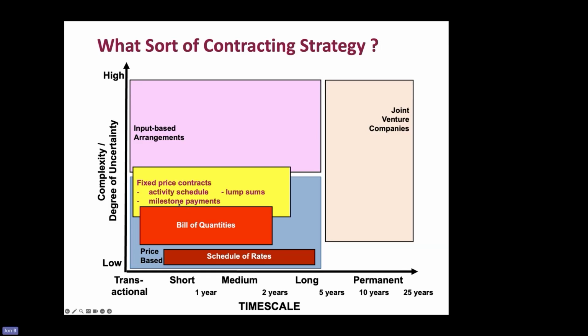And what has disappeared, but used to be in the old GC Works one, is milestone payments. And milestone payments are where the client specifies, if you like, what the contractor is going to get paid. The problem under GC Works was you could have a £10 million contract, say, and the client, Defence Estates as it has become, would specify 10 milestone payments.